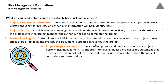The project scope statement will be needed as well. It can be defined as the approved project and product scope. To perform risk management, it's important to have a finalized project scope statement that describes the complexity of the project. It also includes information about project constraints and assumptions. Wherever you have constraints or assumptions, there is a potential for risk, so you will always revisit them to identify additional risks.